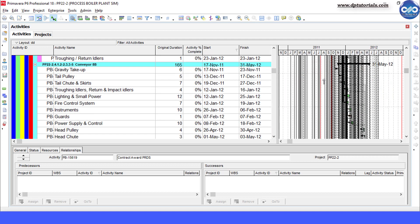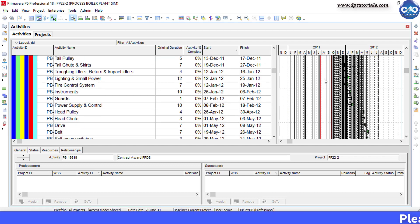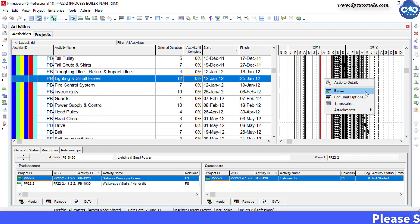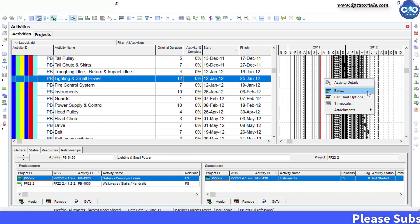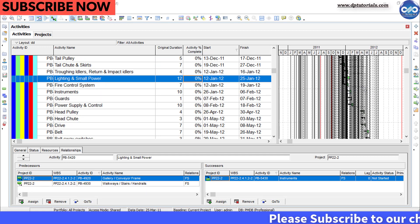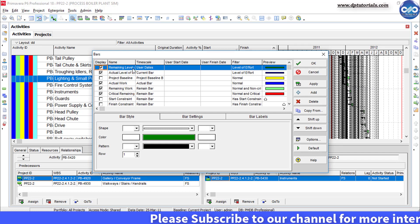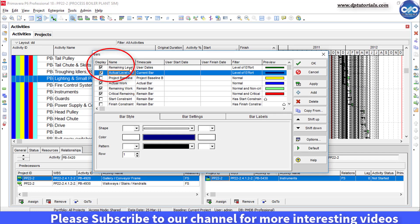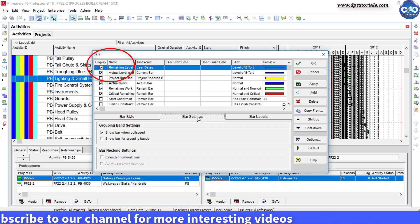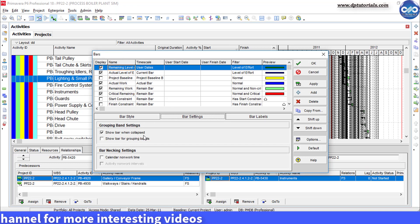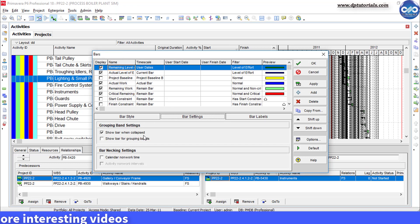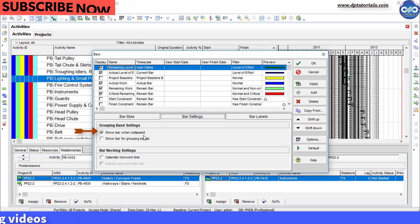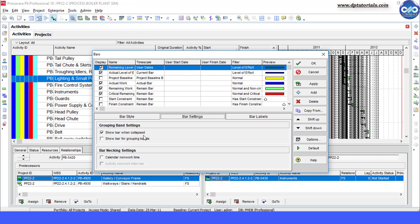So to do the trick, right click on the Gantt chart portion, click on Bars. Now select the bar which is being showed in the Gantt chart. Like this one. Go to the bar settings here at the bottom. And by default, the show bar when collapsed option is checked in Primavera. Now you need to just uncheck them.